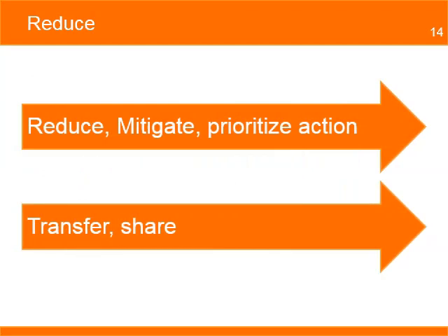Reduce a risk is a strategy to reduce or mitigate the impact of the risk, but will not eliminate it. One reason is that the costs are too high to avoid it, but the impact and probability are low so that the project can still absorb some residual risk. Share means transferring the responsibility of the risk to a third party, for example, to buy insurance or hire a company to complete a work that has that level of risk.